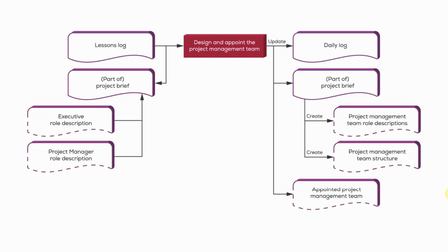This might be a project of this size. Previously, the project manager had to do their own project support, and as part of the end project report, the project manager reported that they felt that impeded their ability to manage the project effectively. So learning from that experience, let's appoint a separate project support resource, someone to deal with the project administration entirely, and that might make this next project more effective. That's a sort of lesson that we could apply to this related team structure.